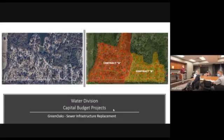Mr. Keenan, Corps of Engineers money, how does a neighborhood like Green Oaks qualify? What are the qualifications for grant funding? It was part of their funds, and we worked with them probably about 5 years ago. It started an initiative, and they're helping communities on collection systems. So that's what it was targeted for, and we were very fortunate that they moved it up. Initially, we were going to be about 100. They moved that up to about 1.3. Of course, we've got to match it now. That's part of our budget. What's our match, 50% on that, or what? 25.